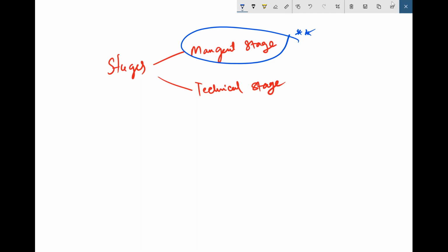So you have to say Prince2 recommends management stages. So the question is, what is meant by management stage and what is meant by technical stage, right? If I have to tell it in a slightly different way, technical stage is more like waterfallish. That means initially people will be working on requirements, then on development activities, and then on testing activities. There can be some overlap here and there, but only skilled people of one kind will be working in each stage.